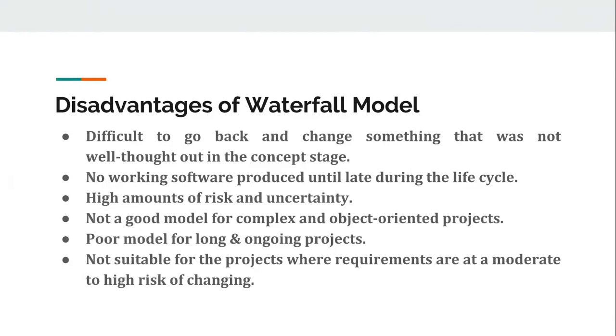So when to use this waterfall model? This model is used only when the requirements are very well known, clear and fixed, or the product definition is stable, the technology is understood, there are no ambiguous requirements, and there are ample resources with the required expertise which are freely available. Also, this should be used when the project is short.